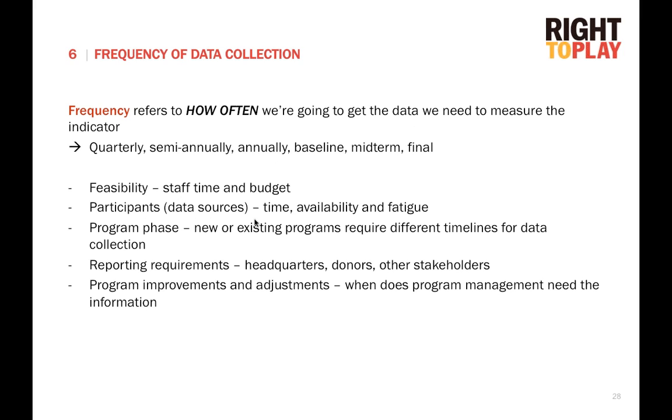But for the PMF, we just need to get a general sense of how often you're going to collect that information. So it might be quarterly, it might be semi-annually, it might be annually, baseline, midterm, or at the final evaluation of the program. There are a number of things that you want to consider as you're developing your frequency and filling out that part of the PMF.